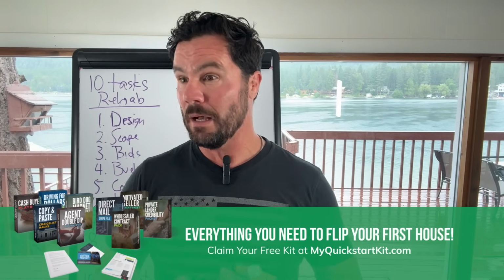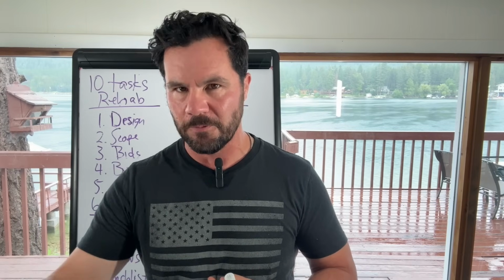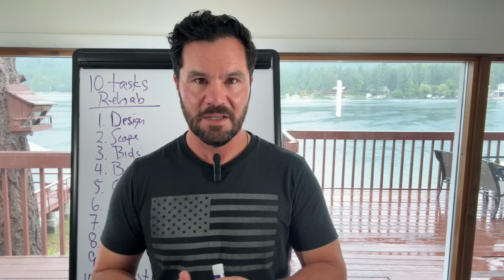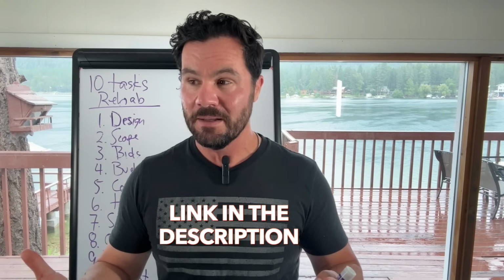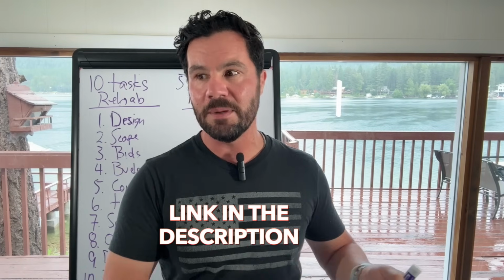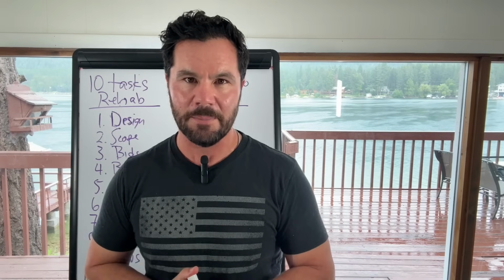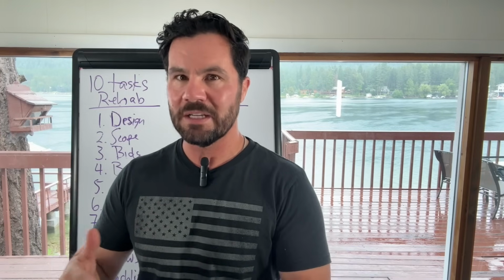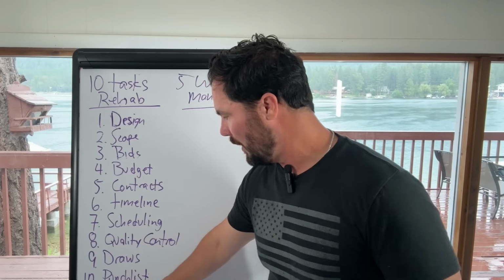I never want to be upside down where I've paid them more than the work that they've performed up until that point. I've got a video where I talk a lot about that. If you do that wrong and you get upside down, contractor runs the job. You have to always be running the job, meaning they're doing work, getting paid for work completed, and you're always ahead of the contractor. And then the last one, number 10, is the punch list.